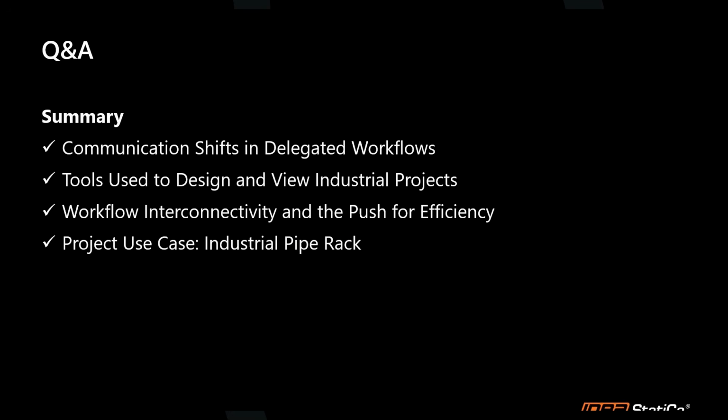As far as our internal checks, we also have data communication logs and ensure proper document control in our quality process. Every transmittal, every document that is either received or sent is very clearly logged in our system: when it was received, what it was, and typically a record of who sent it to.